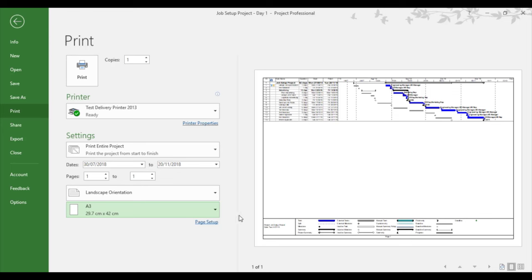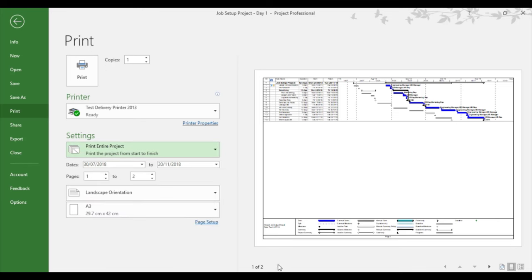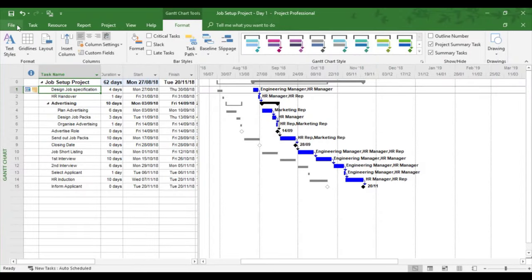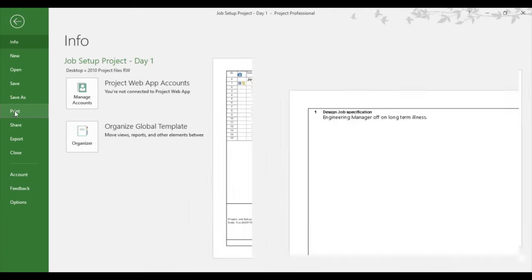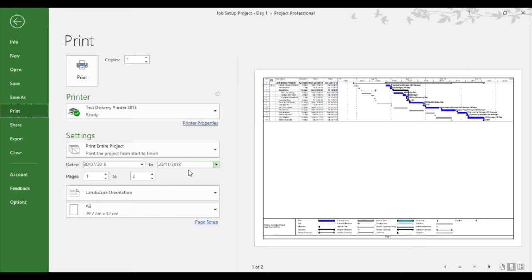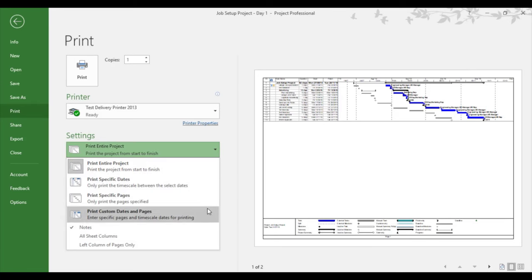If I want to add notes, I can go into settings, click the drop-down arrow, click notes. Now a second page comes along. Click the right-hand arrow and I can see the reason for the delay. So Project is not set up easy for printing. It takes some work on the time scale to affect its printing, and then looking at settings like print, whereby we can print notes. That's a useful setting.